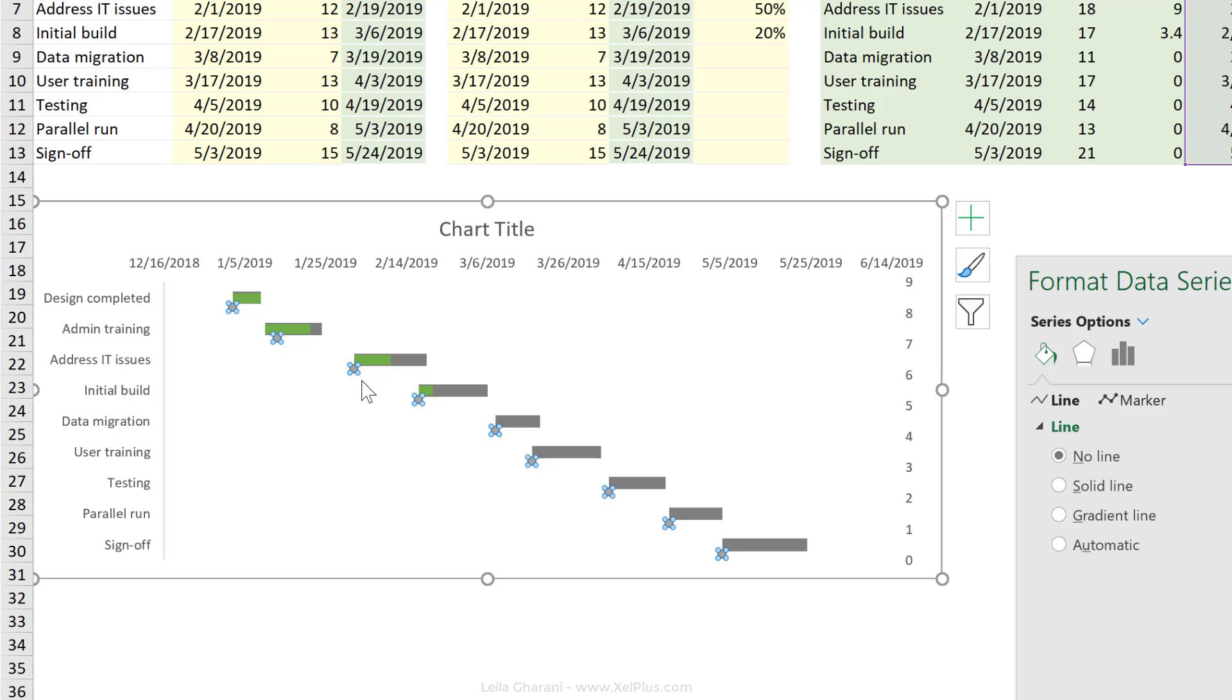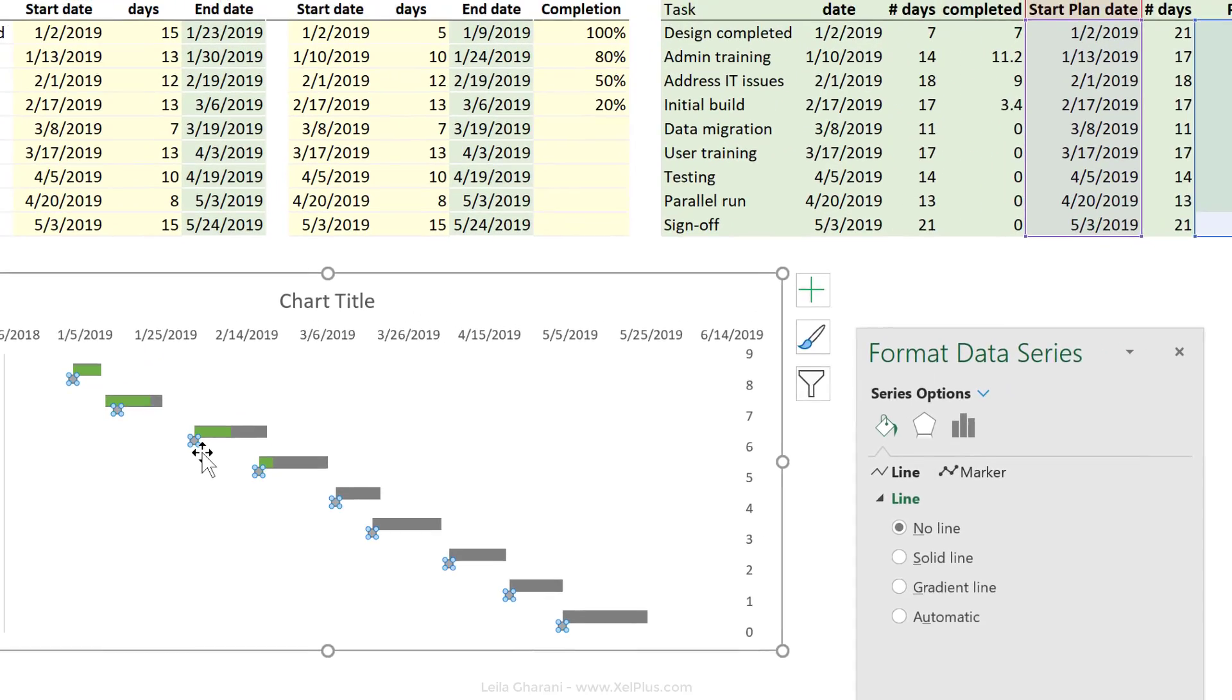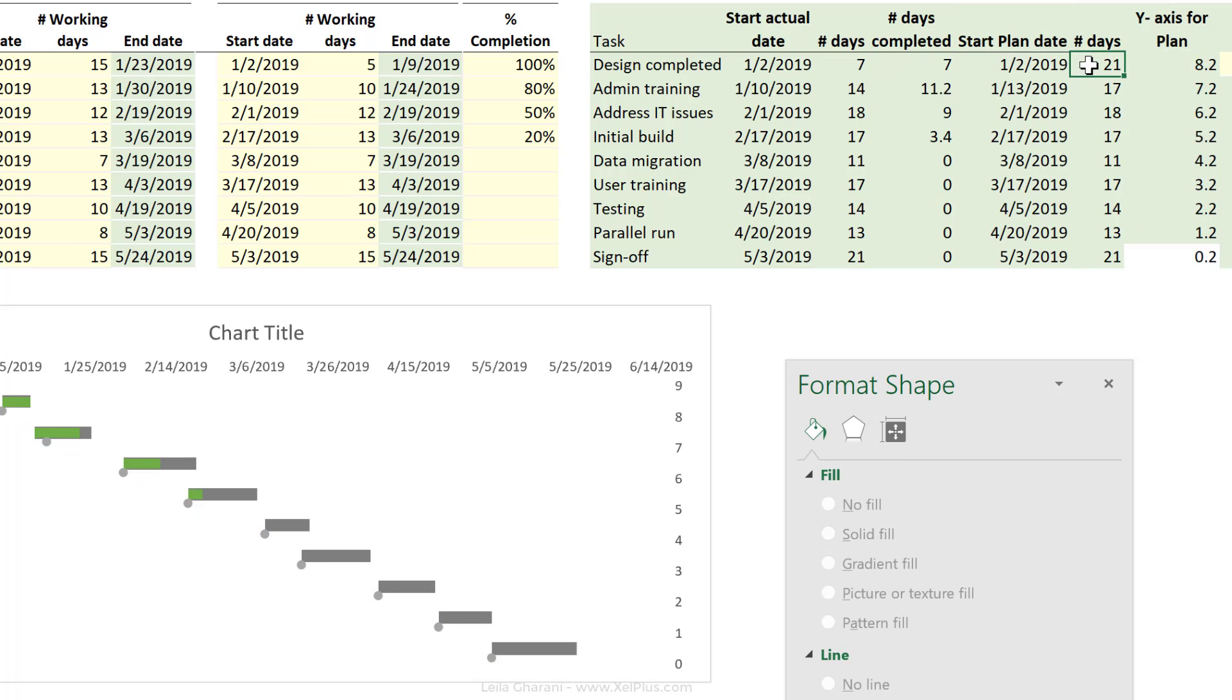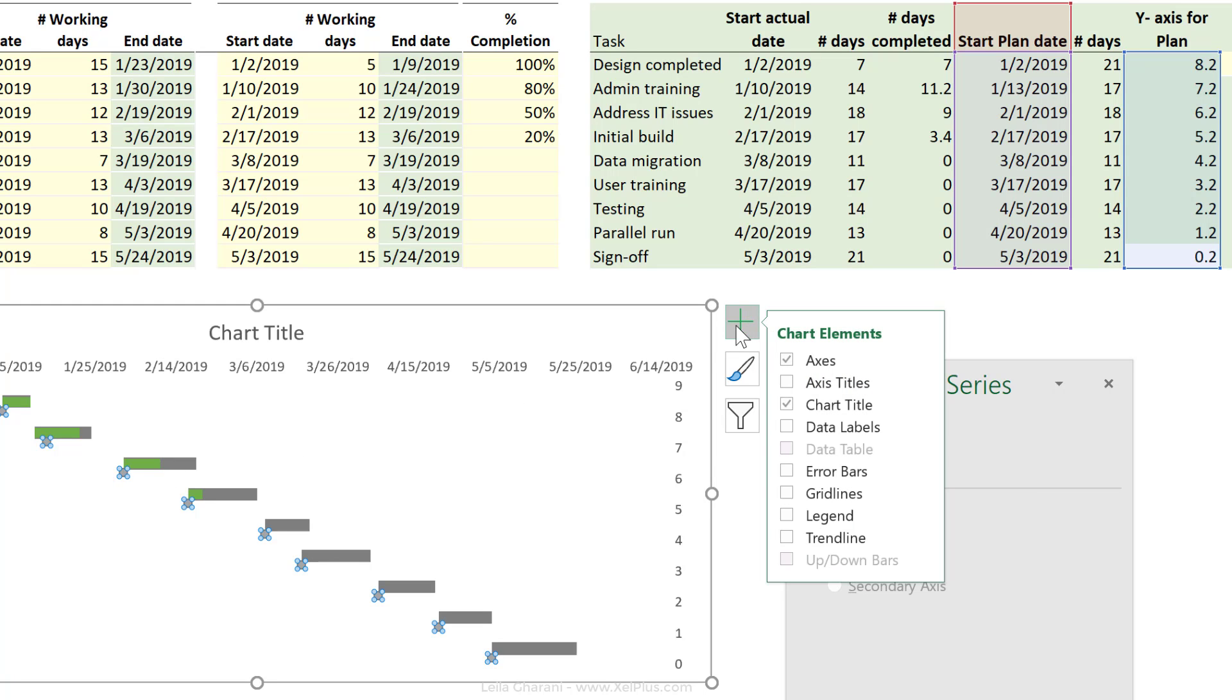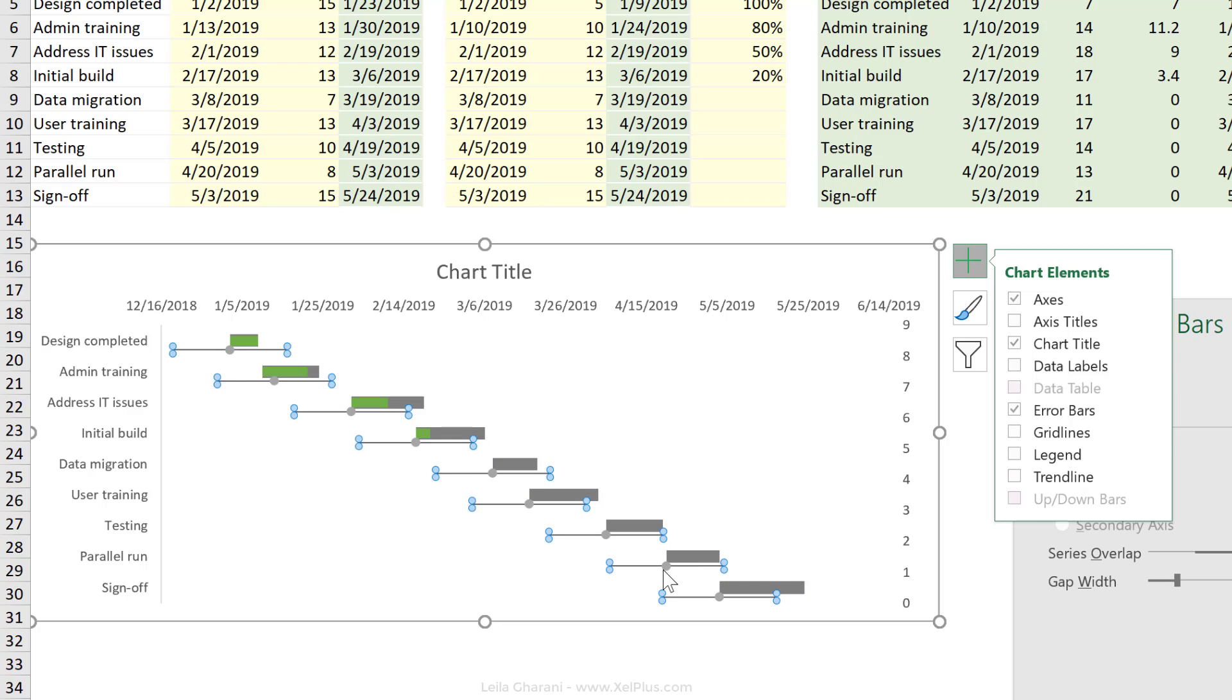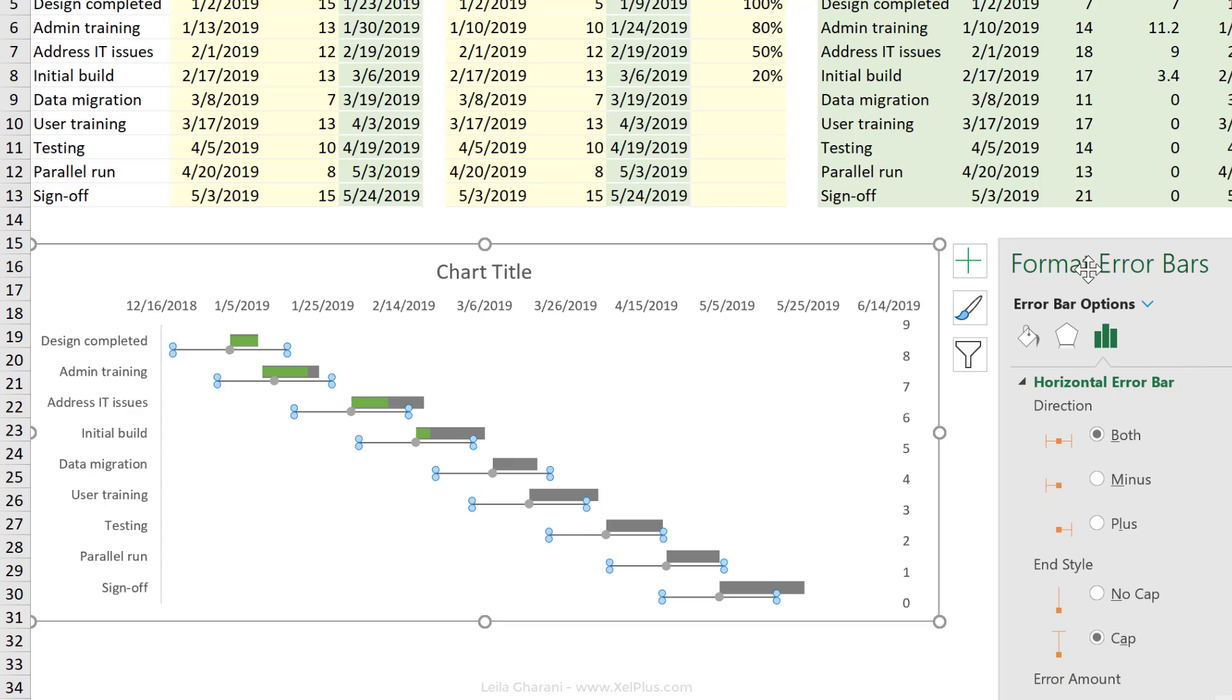Now notice that I get the dot right underneath that bar. I don't want to see the dot itself. I actually want to see the number of days that I've planned. The dot is the beginning of my line. So again here, I'm going to use the error bar trick and I'm going to activate the error bars for the plan. The bar that I don't need are the vertical ones. Just delete them. I need the horizontal error bars. So activate them.